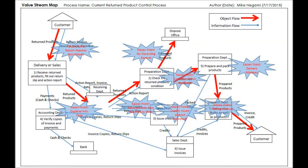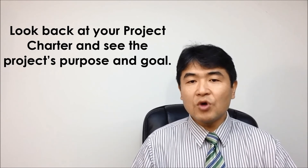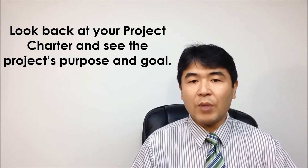Overall, we have many Kaizen Points. Ideally speaking, we would like to design a new process that solves all these Kaizen Points, but that may delay your project with scope creep. Look back at your project charter and see your project's purpose and goal.